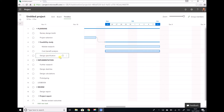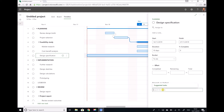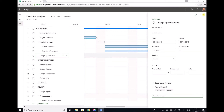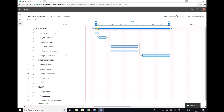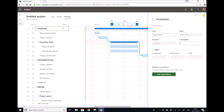Next we have our design specification, which lasts 10 days but can't start until our feasibility study is complete. So we add a dependency on feasibility study and the Gantt chart updates accordingly. We can now see our planning lasting 25 days, or five weeks. If we're ever unsure, we can open up the details for that task and it will tell us the duration — it's greyed out because it's constrained. Let's move on to implementation.